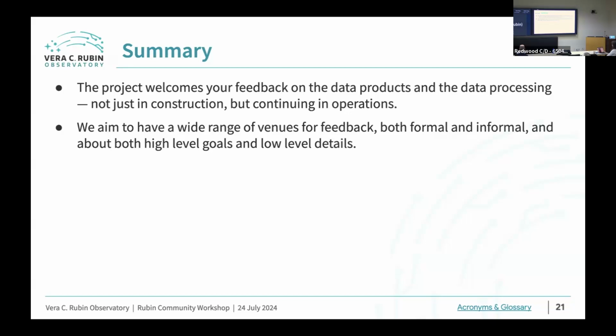Then you start the next stage of the pipelines, which emits its own metrics and plots. They monitor it. At the end, they certify that, say, yes, we can move on to coadd processing, same thing for coadd processing, same thing for DIA processing, and these are the stages of the DRP processing. But there's time to pause and reflect on the quality at each stage.